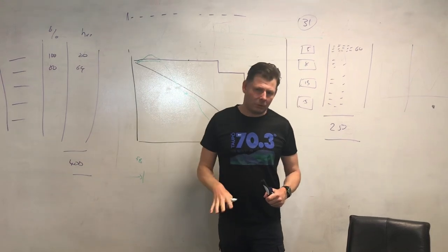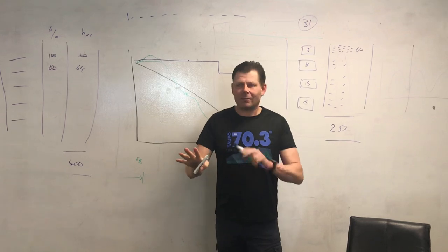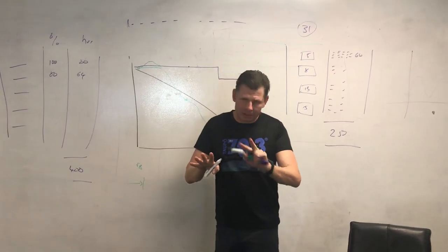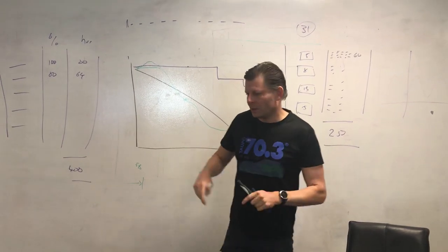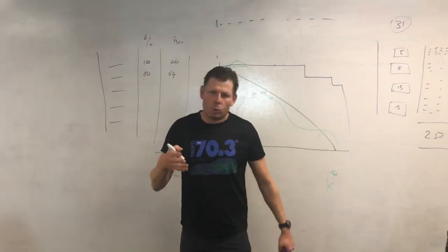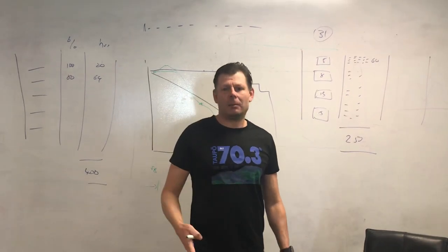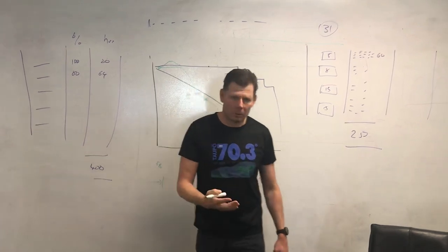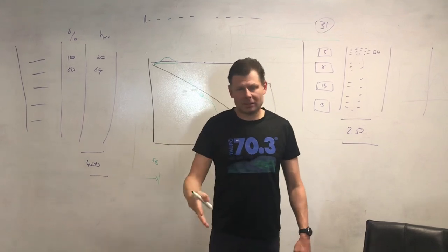When we go into part two of sprint planning, we actually task out and add hours to each task. Now, I recognize that when we're planning, we use story points to pull the work in, and we use the empirical data of a previous sprint's velocity. So this is for a different reason. Before we go into that, we need to talk about how many hours there are in a day. Most organizations, and here indeed, we are paid for 8 hours a day, but we know that we probably only have 6 hours productive time. So in the timesheeting that we do to capture the capex costs, we only include 6 hours a day.